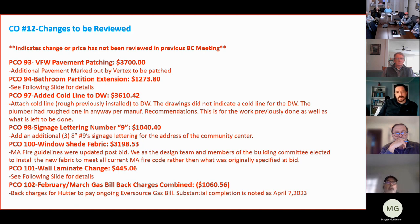However, it wasn't on the drawing, so essentially what they're doing is adding the cost of putting that roughing in, as well as holding it to attach it to the dishwasher. So this is one that, again, is ongoing to us. It's not exactly a change. It came through an RFI, so we're still reviewing this price and making sure that this is actually